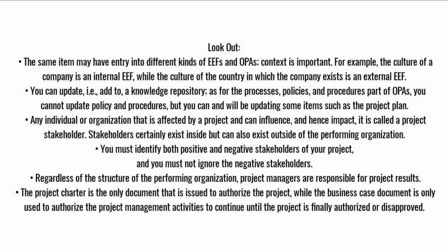Context is important. For example, the culture of a company is an internal EEF, while the culture of the country in which the company exists is an external EEF. You can update, i.e., add to, a knowledge repository. As for the processes, policies, and procedures part of OPAs, you cannot update policy and procedures, but you can and will be updating some items such as the project plan.